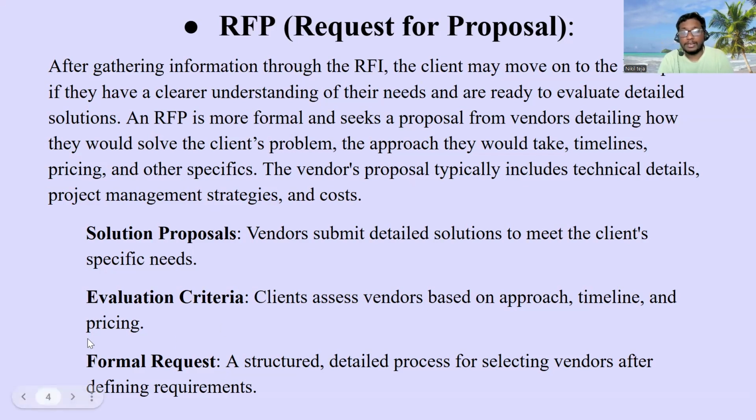An RFP is more formal and seeks a proposal from vendors detailing how they would solve the client's problem. As I said, they will be sending the detailed reply to the client based upon the RFP: the approach, the timelines, pricing, and other specifications. They will be sending the detailed document based upon the timeline, scope, as well as pricing. The vendor's proposal typically includes technical details, project management strategies, and costs. As I said before, they will be sending a detailed document with all the strategies, timelines, processes and systems they will follow.